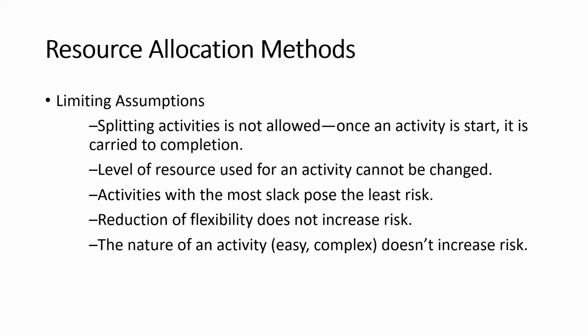In the resource allocation method, these are the assumptions that we are limiting. There are some activities that cannot be split. Splitting means we cannot divide the activity. If we have started one of these activities, we have to complete it, carrying it up to completion.